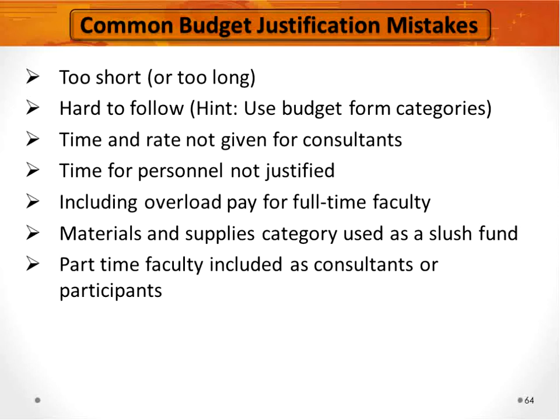You will absolutely be asked, if you have consultants, why you haven't specified the amount of time they'll be spending on the project and what their daily rate is. Again, time for personnel. Let's say you just ask for someone to have 100% release time for their entire academic year, and you haven't really justified that. That's one of the things that will come back to haunt you. You will have to fix that.